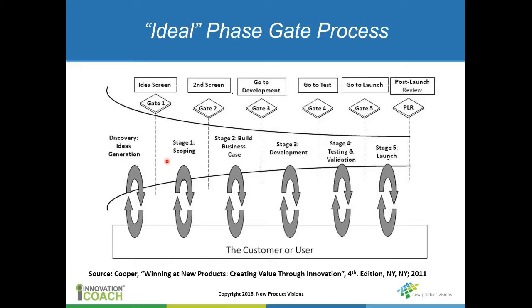This process was originally put in place as a portfolio management tool to give management an opportunity to look at a collection of projects and make investment decisions at each of these gates. That's really what it's about: as you move through the development, you're increasing the investment in the project. Typically, the process is documented as part of a quality system, so it might be part of your ISO system or whatever other quality system you might have in place.